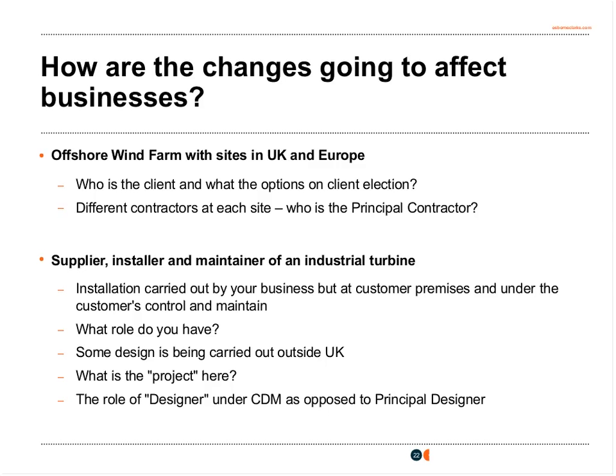Who takes the responsibilities? Well, the guidance goes on to say that if a design is prepared or modified outside Great Britain, then design duties apply to the person who commissions it, if they are established in Great Britain, or if not, the CDM client. So what this means likely in this scenario is that your business in the UK is going to pick up the responsibilities of the design, even where part of it is being carried out outside the UK.